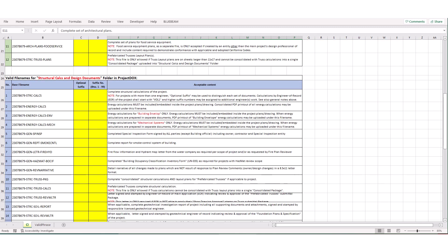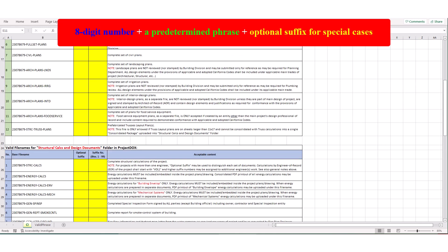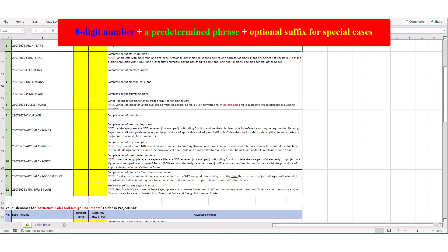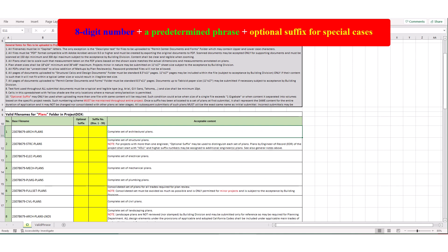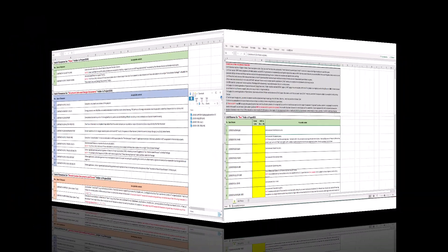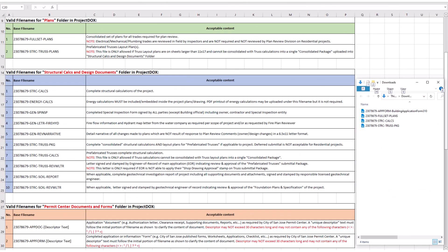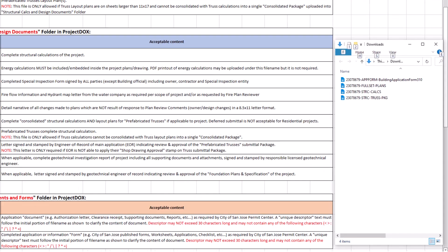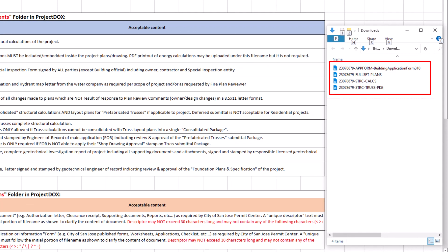In general, file names are comprised of an 8-digit number indicating application year and sequence, plus a predetermined phrase indicating the content type, plus an optional suffix for special cases noted before. Once you have entered the required information in the Excel file, you must name all the submittal documents matching exactly with the auto-generated names from Excel sheet. For this example on a single-family residential project, a few examples of acceptable filenames could be as shown here.